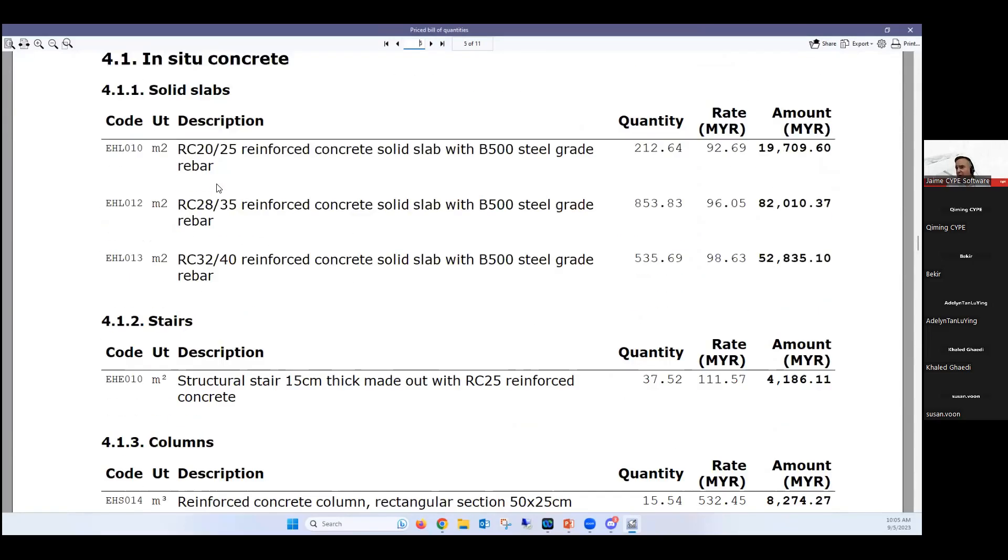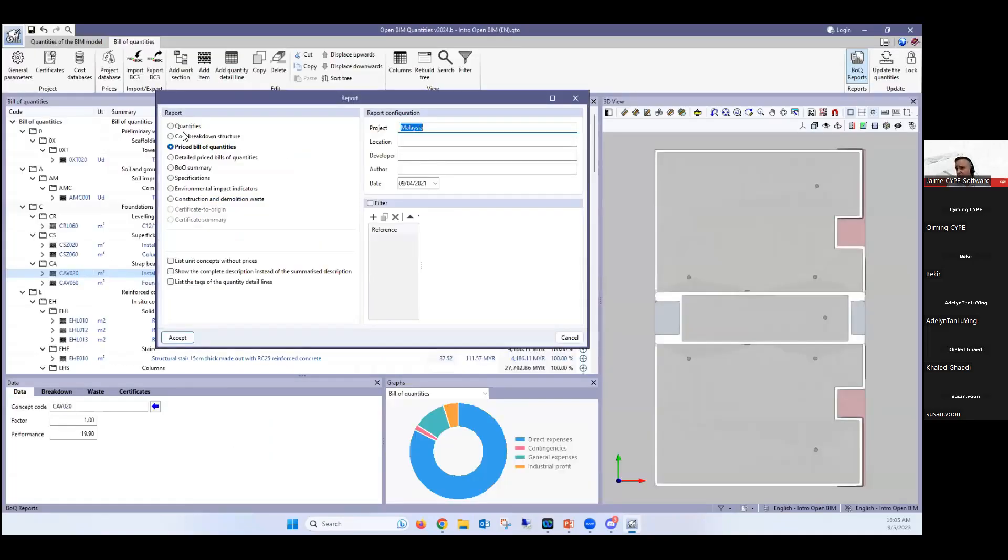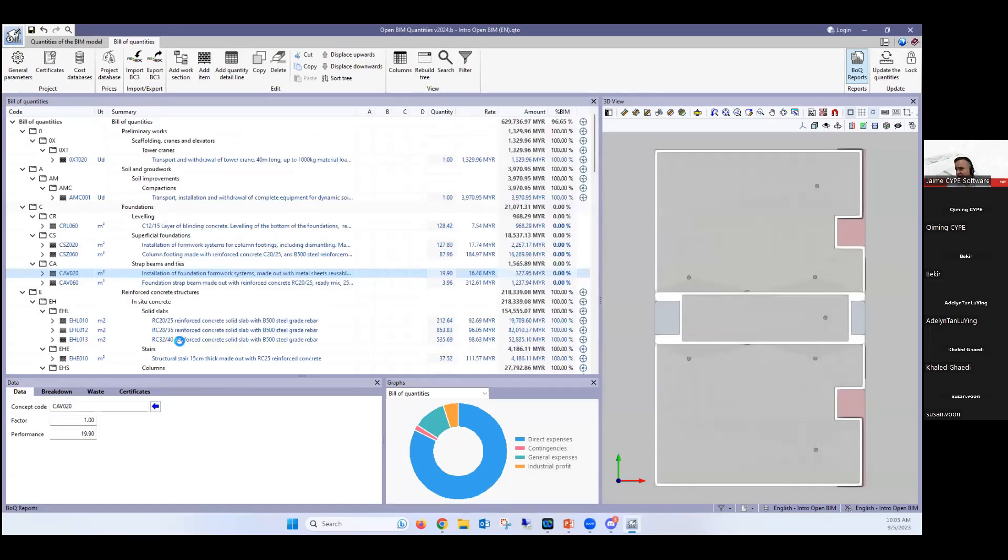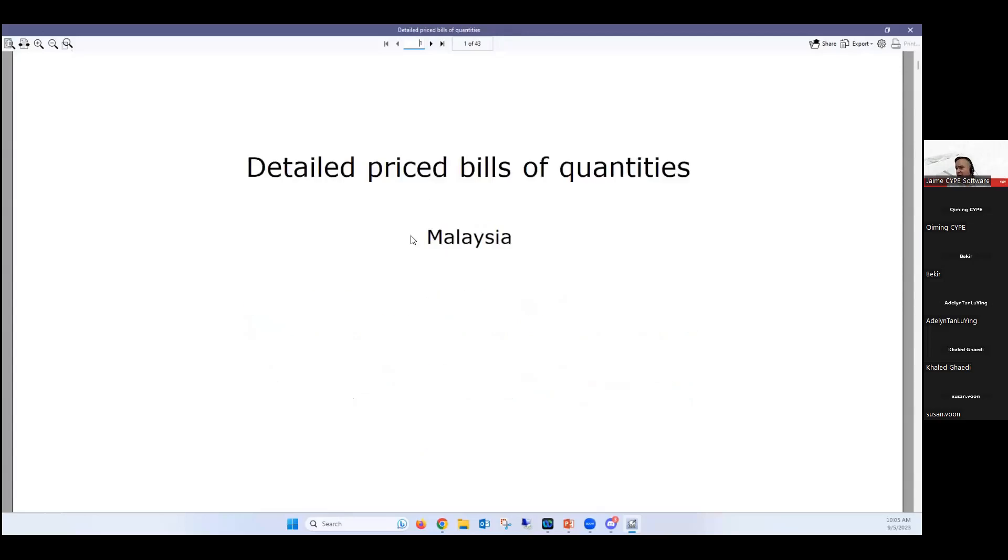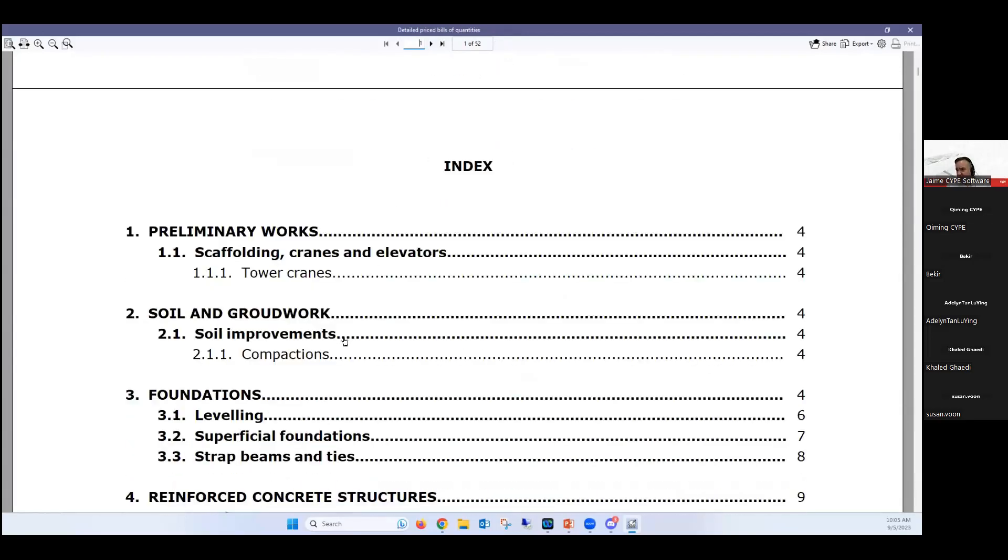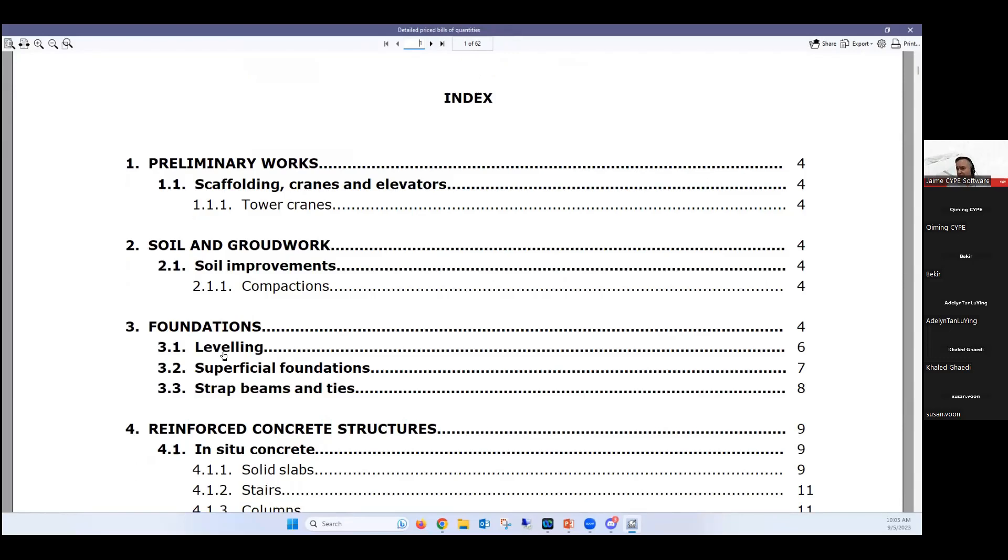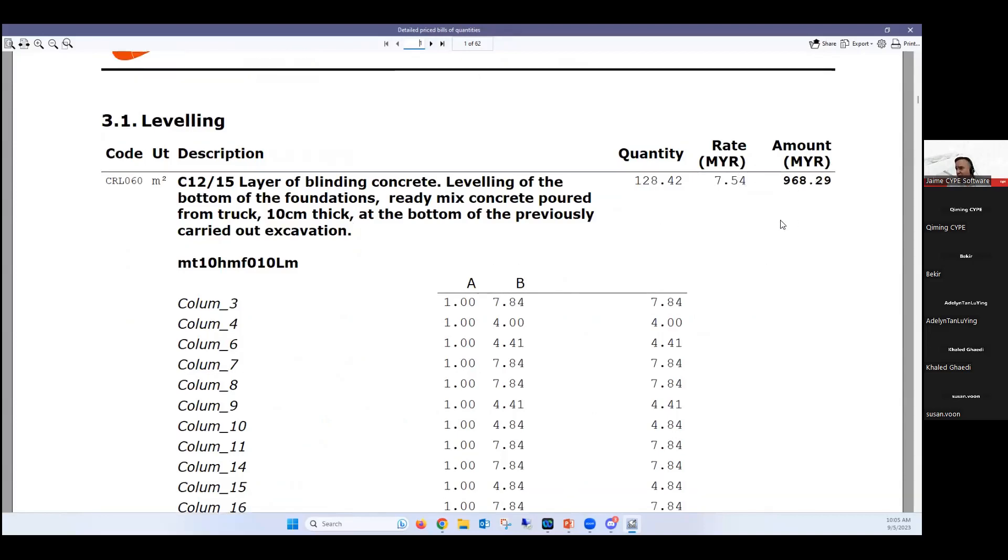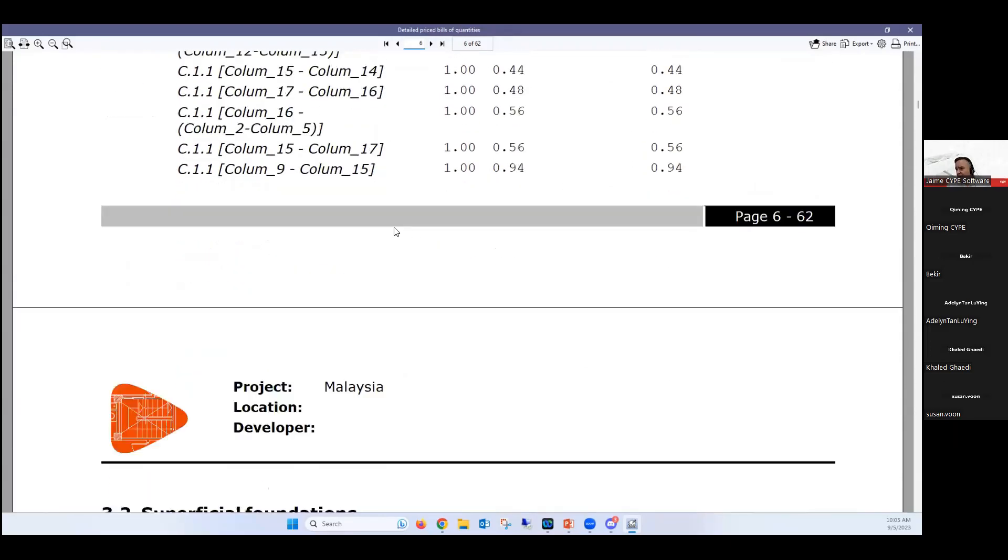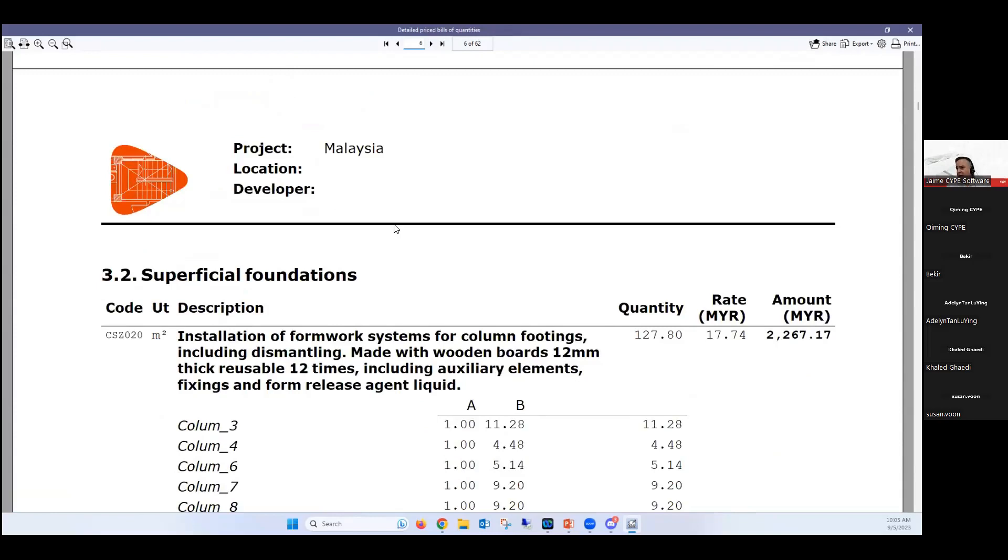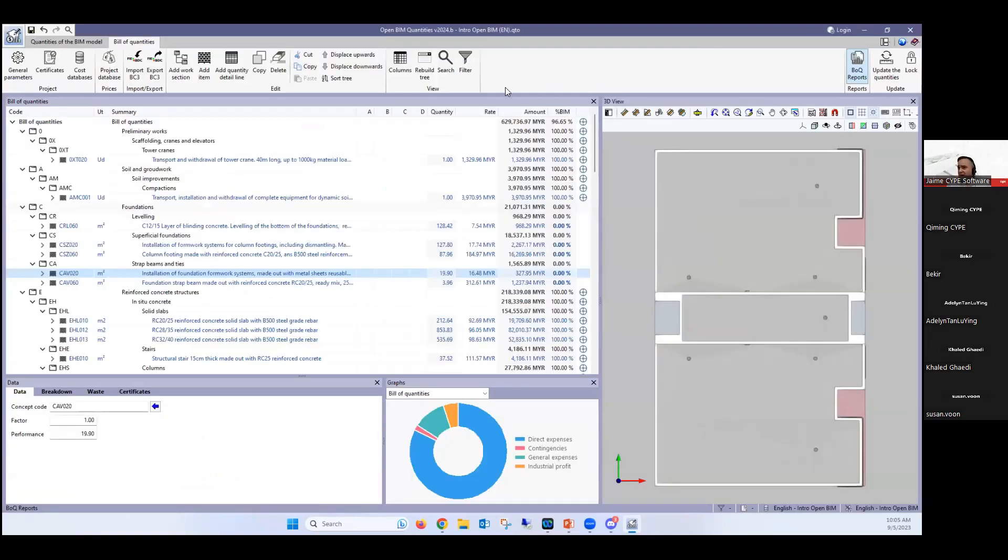And for example, if we look at the part of the concrete, we have different types of BOQs that we could generate. We could do just the quantities. We could do a cost breakdown. We could do price bill of quantities. We can even customize it. Let's see the detailed bill of quantities. It's normally the one that's the most complete. It's generated like 37 pages already. And you'll see that this, for example, if you look at any of the parts, it'll have a breakdown, it'll have a quantity, it'll have a rate, it'll have a total amount, and then it'll have a breakdown of all of the different quantities here as well.